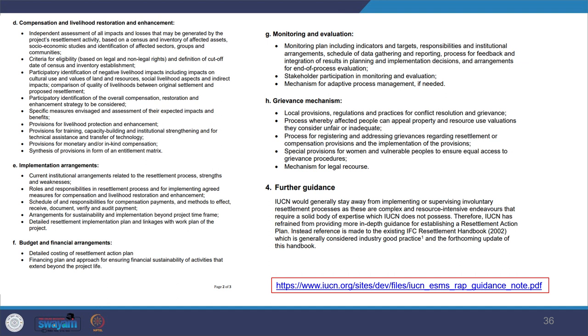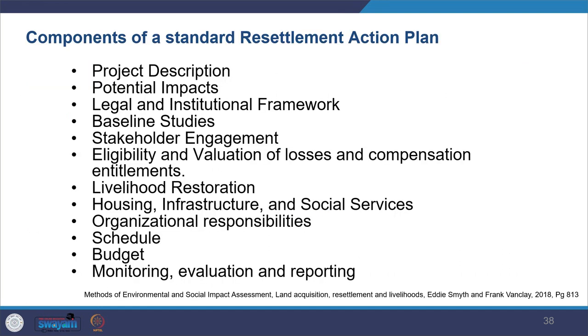So you also see the book provides components of a standard resettlement action plan. You see the project description, potential impact, zone of impact, and alternatives which you have considered; the magnitude of displacements, what number or proportion of people will be displaced or migrated; the impact on household structure, community buildings, and so on; then the legal and institutional framework, then the baseline study, what kind of surveys you have undertaken,